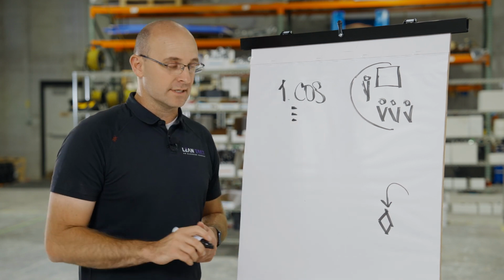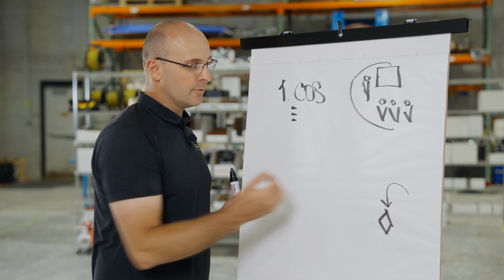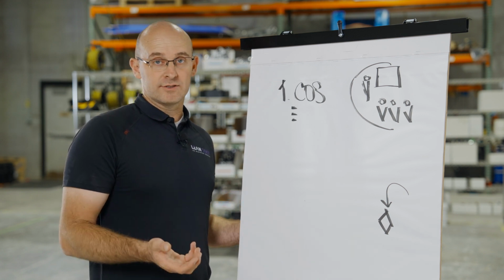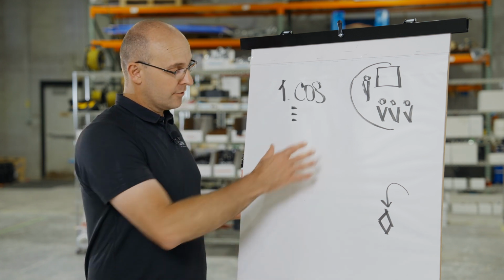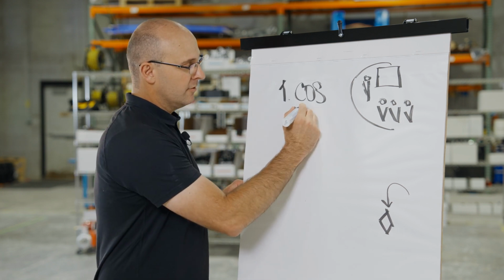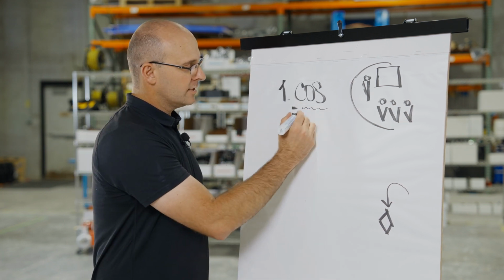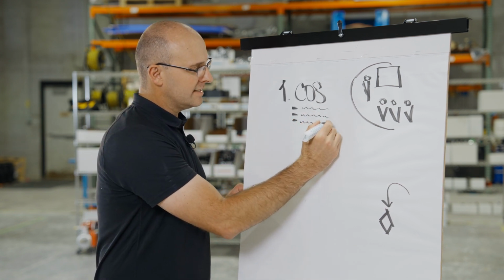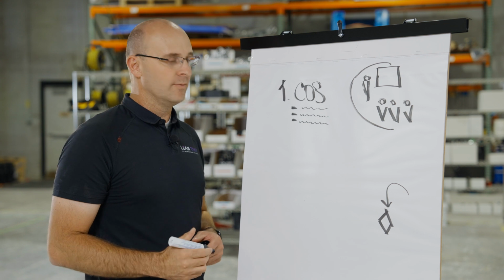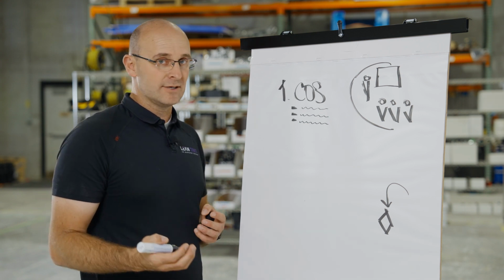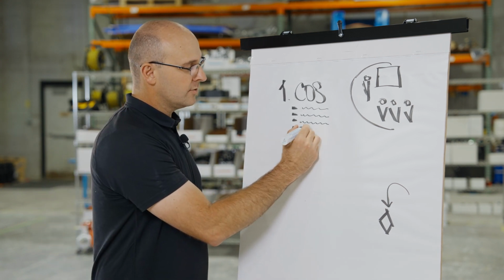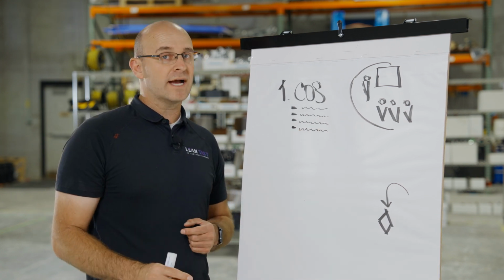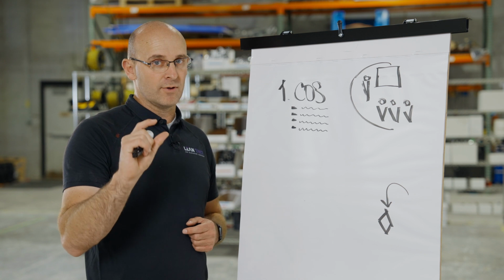I'll give you a for instance. I would say, all right, we're pull planning for this floor right up until the time that we install drywall. And for the pull plan, I want it to be fairly high level. I want it to cover the entire floor, and I want all activities in there for every trade partner in the room, and we're going to complete a complete sequence, and we are going to attempt to gain on time and see if we can pull that back, because from a schedule standpoint, we want to gain 2 days.